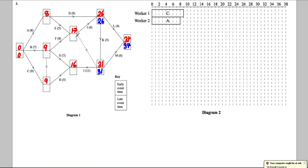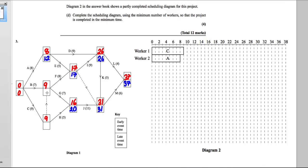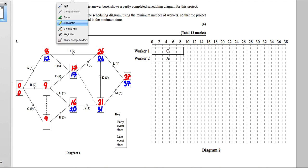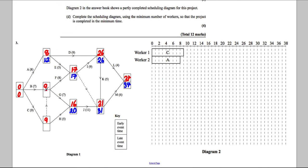Continuing backward: 26 − 9 = 17, or 31 − 0 = 31; we want the smallest, so 17. The next node: the only way is 31 − 11 = 20. Then: 26 − 9 = 17 or 17 − 5 = 12; we want the smallest, so 12. For the next node: 18 − 8 = 9 or 20 − 7 = 13; the smallest is 9, so we write 9.